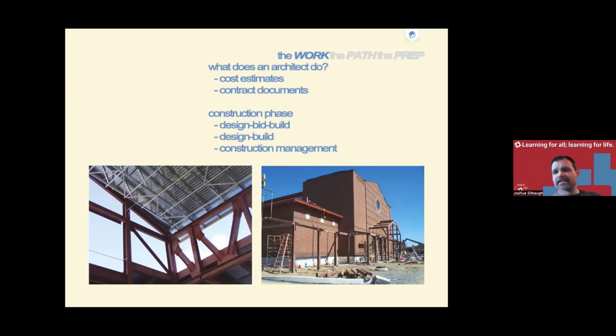And the contractor has input in the design, and you're working on that together all the way through the design and construction phase. But in both cases, the point is the architect is there through construction. They're reviewing submittals. They're making visits to the site to observe what's going on and make sure that everything is being done correctly. And in some cases, as that last point shows, architects can become construction managers. They can make a career out of simply managing construction. There are many architects who do that and don't really do design.